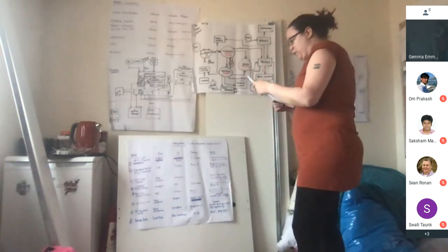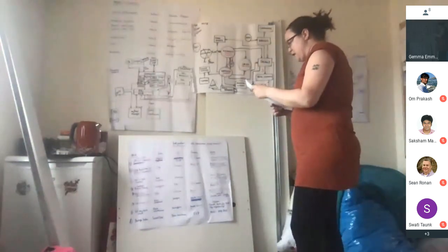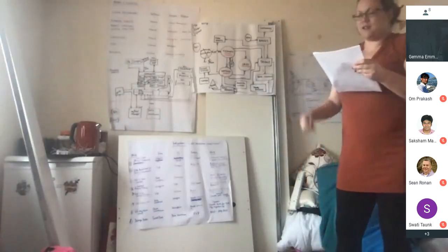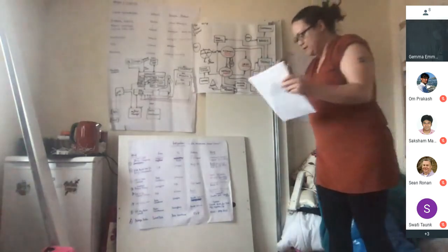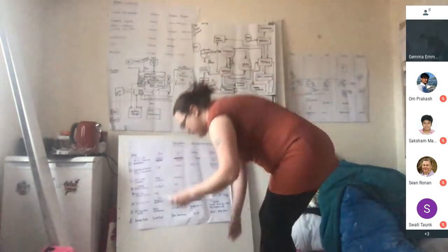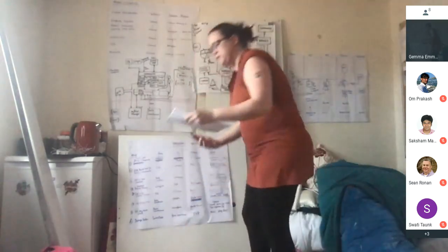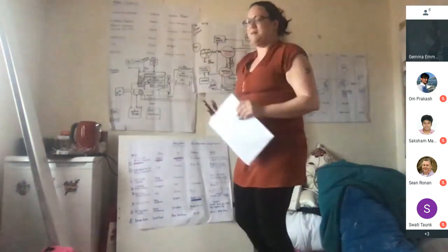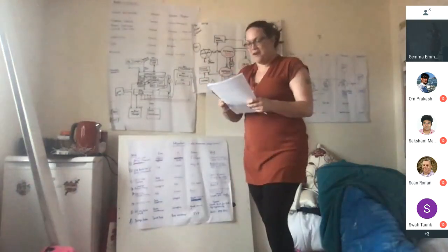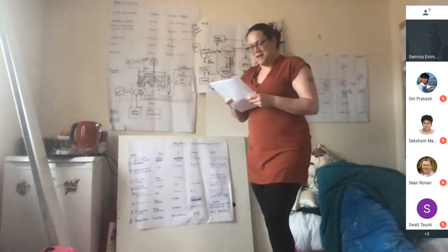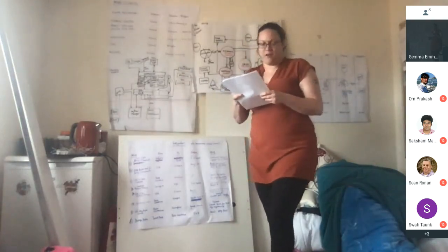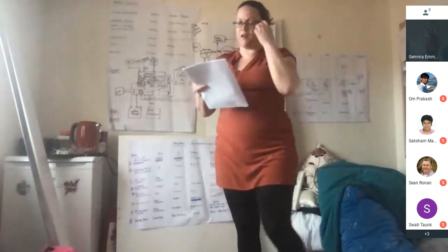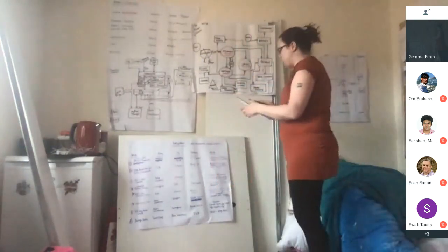Anyway, one thing we can see is that there is a risk in that the organisation wants to increase technology innovation and encourage all teams to spend part of their working day brainstorming. To me, the risk of that is you get an awful lot of ideas coming in, and a huge backlog of ideas, and if we are breaking it into trials and drug research, some of those areas cross over each other.